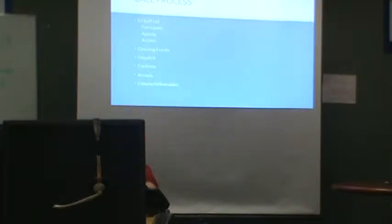Most of our work that's non-CDW, technicians do have to contact somebody else. They have to call into somebody else's help desk. So there you would mark that and identify who to contact. For example, for Home Depot, we had to call the Home Depot help desk or the NCR rollout help desk to let them know this asset is now on the network so they could activate it. Otherwise the system wouldn't work.